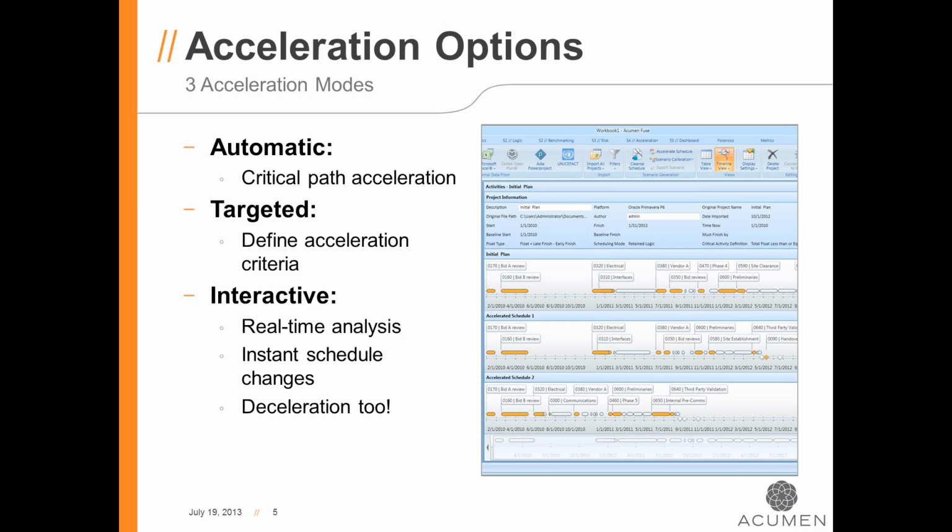Perhaps we were creating a proposal schedule that was based on some past work that we've done, and there was a higher or lower complexity factor to the proposed work than to the past work. We could load in that old schedule. We could change the sliders around to add or decrease complexity and then export it back.